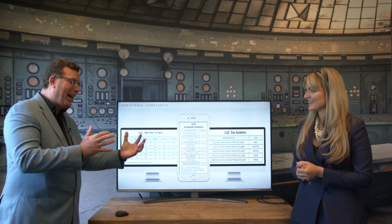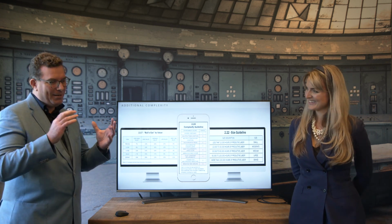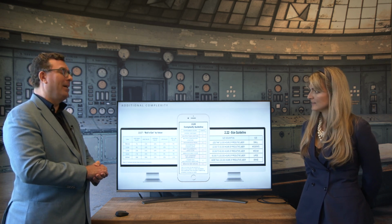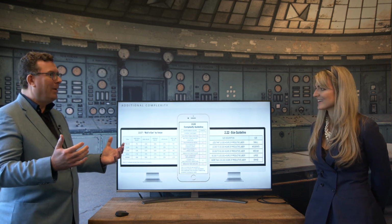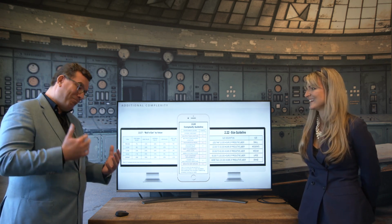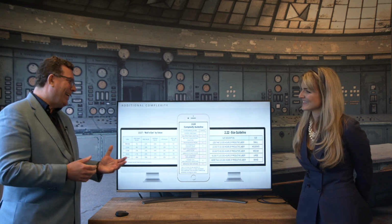Well, let's give an example outside Europe. That is much more easy for me. So when we look at Australia, far, far away, they need to have their employees given a salary. And that system cost more than $1 billion Australian dollars. And because it was so huge, they weren't able to deliver it on time and of course on target. So when it got live, some people got too much and some got too little. But when they got too much, they couldn't refund their salary, so they get discounts in the months after that. I think that is a real grand project.